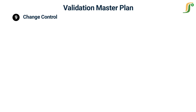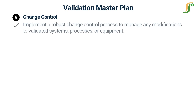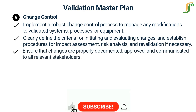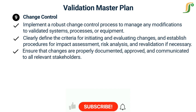The ninth step is change control. Implement a robust change control process to manage any modifications to validated systems, processes, or equipment. Clearly define the criteria for initiating and evaluating changes, and establish procedures for impact assessment, risk analysis, and revalidation if necessary. Ensure that changes are properly documented, approved, and communicated to all relevant stakeholders.